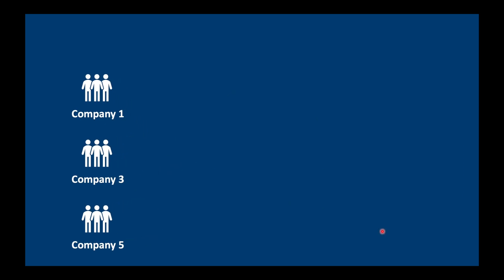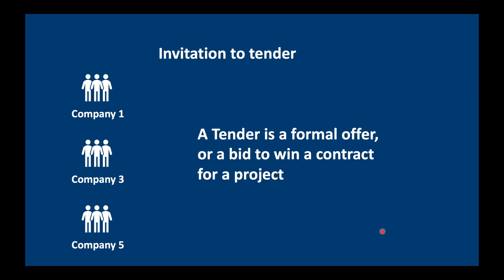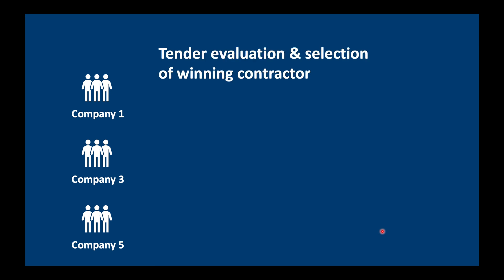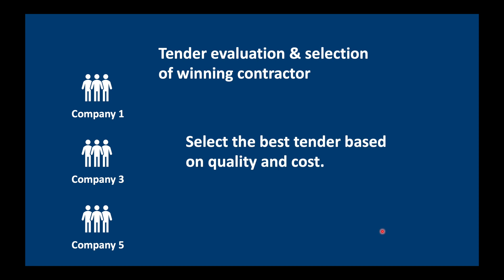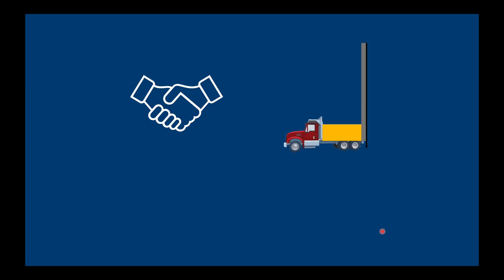Once we've selected our preferred list of contractors, we're going to invite them to tender. A tender is a formal offer or a bid to win a contract for a project. These tenders are evaluated by our tender evaluation committee and we select the winning contractor. We want to base our decision on quality and cost — not just cost. Don't just pick the cheapest one; you've also got to make sure that they can do the job.